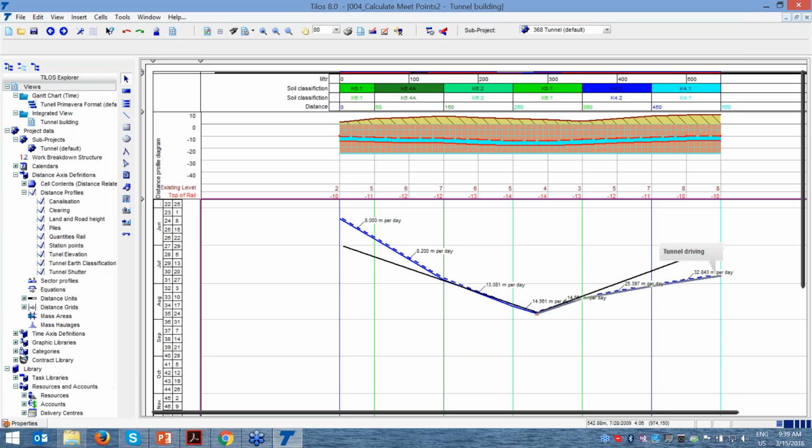I am ordering 2 TBMs. I have one designer, I have one supplier. My TBM supplier has the capacity, just not for doing 2 TBMs at the same time. And my designer has a dedicated team that cannot work on 2 TBM designs at the same time. So this way, we can give the focus for design and procurement to TBM1, and give second priority to TBM2.